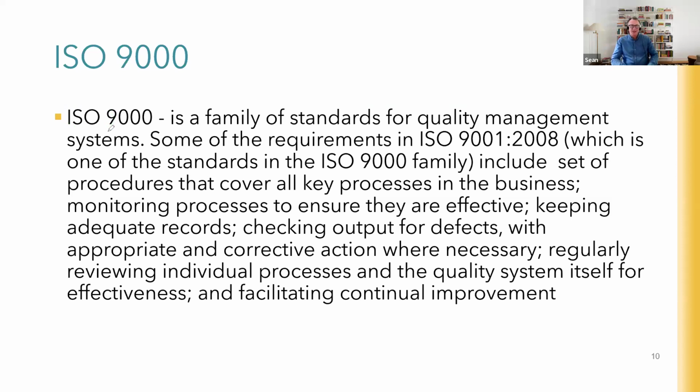But one of the more common ones is ISO 9000 and 9001, which basically says you've got defined processes and you make sure that you follow those processes. And if you've got the processes and can prove that several times a year you check, and that if you find you're not following the processes correctly, you do something about it, you take corrective actions, then you can get ISO 9000 or 9001 accredited. That's slightly different there. And this is often used in the world of procurement.